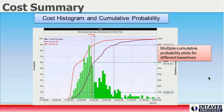Cumulative probability is useful for setting cost contingency, which would be the difference between the deterministic value — seen as the straight red line — and a cumulative probability with a higher confidence level, such as P80. In addition, we can plot multiple cost scenarios representing different risk management strategies as cumulative probability plots. In this particular view, we are looking at pre- and post-mitigated baselines.